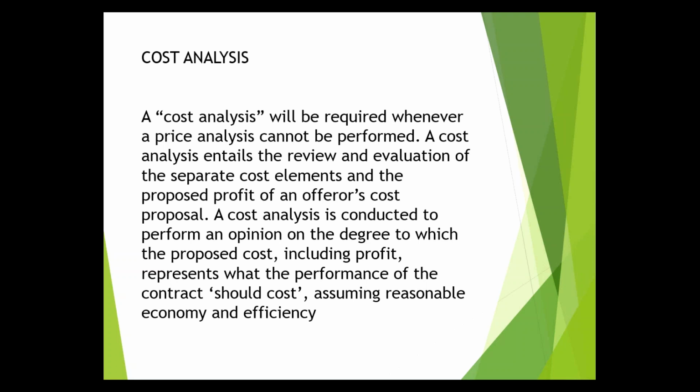Cost analyses are used when bids or proposals come in way outside the price range determined by the ICE. Cost analysis can be difficult and very expensive to conduct. Typically, people need to hire help to do this. And again, this very much happens for the higher-end purchases that you may be making. Again, performing a thorough ICE prior to engaging in a procurement can help to avoid this. Not that I'm advocating for the independent cost estimate or anything.